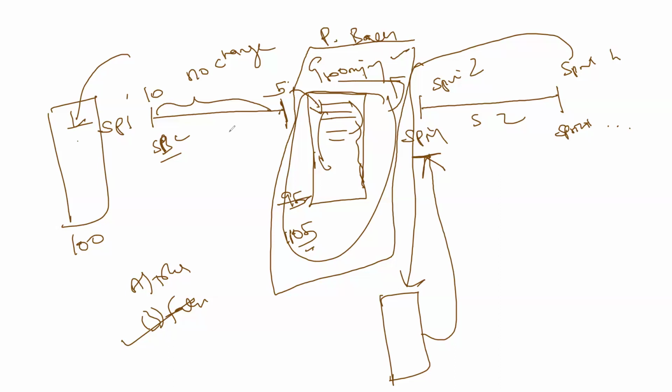So assume you are somewhere here on day 2 or day 3. And customer says, what I'm telling you is more important. In this case, you will cancel the current sprint. Who can cancel a sprint? Product owner. Product owner will say, okay, we got the feedback from the customer. What you're doing now is not priority, cancelled. We will start a new sprint from that day with new sprint goal, with new sprint backlog, another sprint.